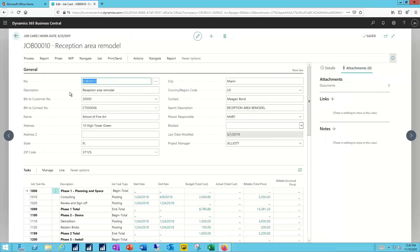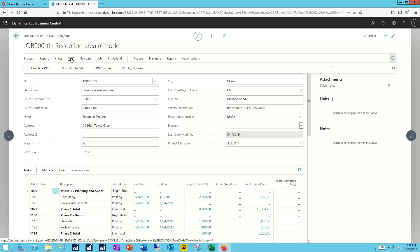Now the first thing I want to do is calculate and then recognize WIP. So I'll go to my WIP drop down. I can choose to calculate WIP based on all the updates that have been made, whether that was done by time entry or at a job task line. Maybe the consumption of items that have been designated or a resource performed work, whatever type.